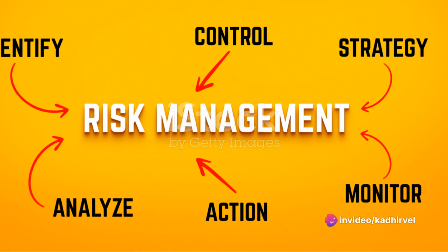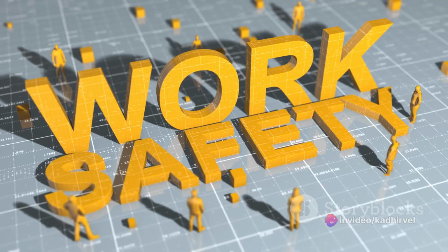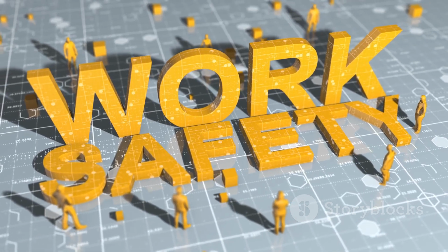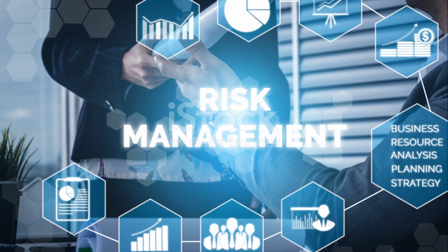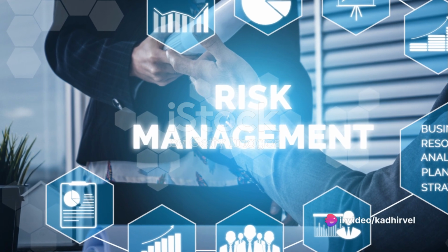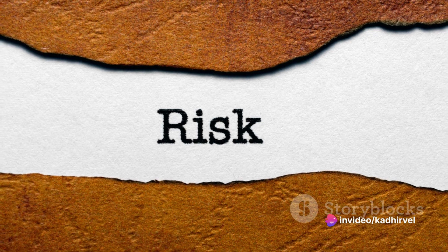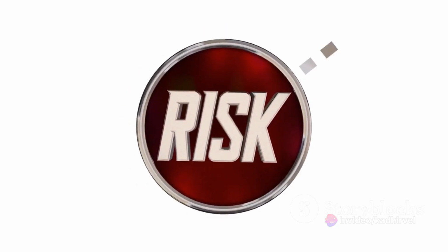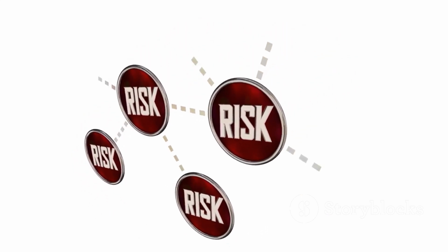To recap, risk assessment is a four-step journey. It starts with identification, spotting potential hazards. The next step is analysis, estimating the likelihood of these hazards. Evaluation follows next, estimating the severity of the impact. And finally, you wrap up with risk management, planning how to mitigate these risks.